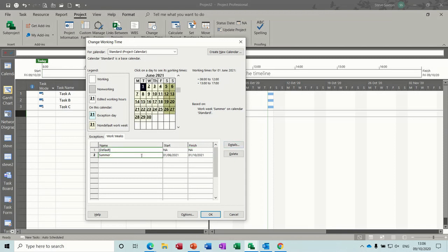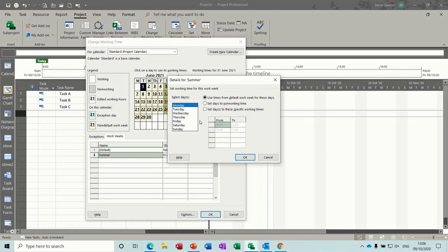The working times for that period, which is all coloured up there now, because it's really, really hot, so I'll just highlight all of these, just down to Friday. Set the specific working times, so tick that. And I'll delete this bottom block, and let's say we start work at 6, because it's quite cool still. I'll just get my cursor in there. Change that to 06.